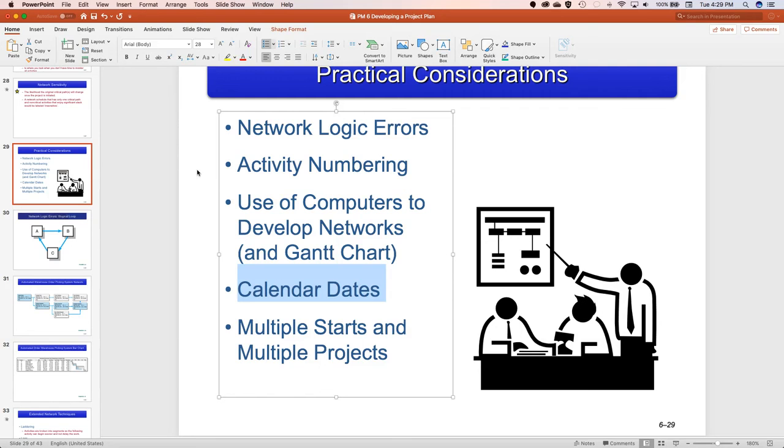I'm going to add to this, right? Somewhere in your notes, I want you to write this down. Generally, when you're scheduling your projects, we consider that there's only 360 days in a year, right? So it's 360 days in a year. So far, so good. We also assume that there's 30 days in a month, right? 12 months per year. This allows us to have equal numbering systems and equal date systems rather than trying to figure out which date we're on, all right? So generally what people will do is they will split it up into periods rather than months. So it's period 1, period 2, period 3, so that we don't get that incorrect, right? We also assume, unless otherwise stated, that you're only going to work 5 days per week, right?